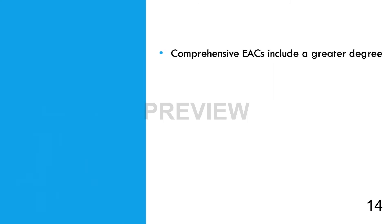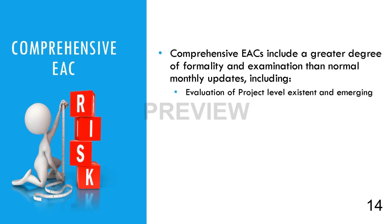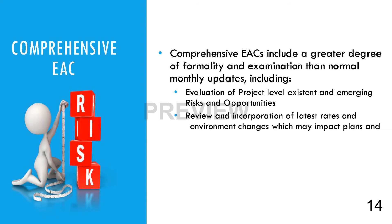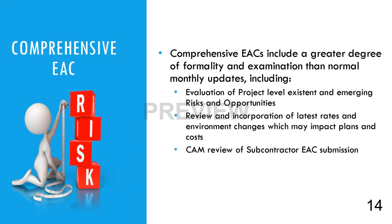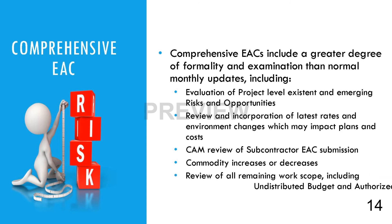Comprehensive EACs are different from monthly updates in that they require a greater degree of formality and examination. This includes an evaluation of remaining project-level existing and emerging risks and opportunities, a review and incorporation of the latest direct and indirect rates, an assessment of environmental changes that may impact future schedule and costs, CAM-level assessment and incorporation of subcontractor EACs, incorporation of commodity increases or decreases, and a review of all remaining work scope, including scope in the undistributed budget and authorized unpriced work.